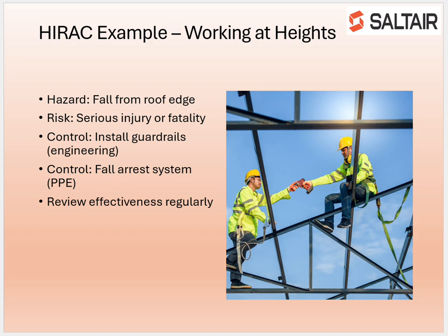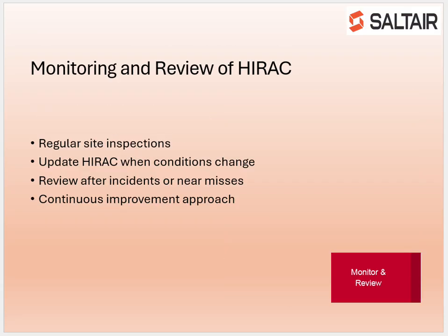For example, when working at heights, the hazard is the risk of falling. This could result in serious injury or fatality. Controls may include installing guardrails as an engineering control and using fall arrest systems as personal protective equipment. Monitoring involves conducting regular site inspections, reviewing incidents and updating HIRARC documentation when conditions change.